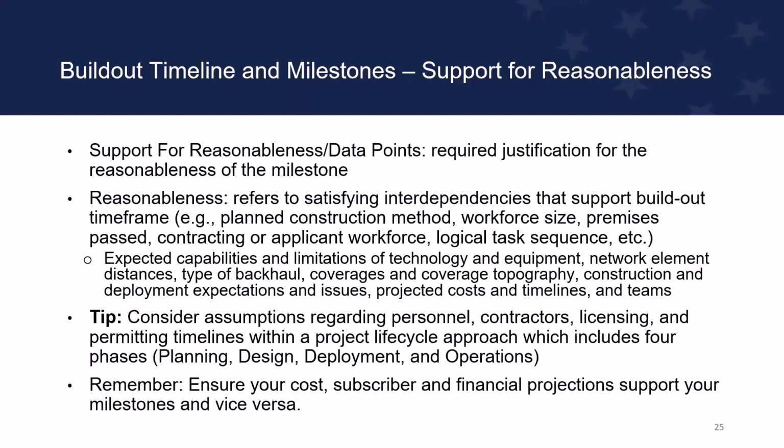challenges may be. And the other thing, again, consistency. Make sure that your subscriber and financial projections support your milestone, vice versa. I can say in ReConnect that most parts of the application report into or rely on other details within the application.